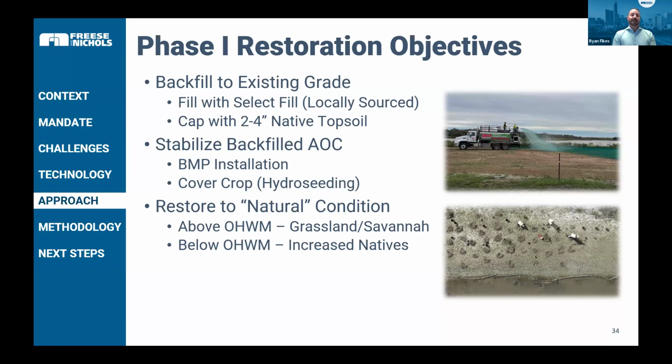And so if you had to collect data, wait to put it on a thumb drive, drive it back to an office multiple hours away, have it reevaluated, make tweaks, and couldn't do that in real time, it would slow the entire process. So this real-time coordination between field offices and our offices with our geospatial analysts has saved the client a lot of money and a lot of time on this project, and really kept from potential contamination, because you don't want to keep those cuts open after they've been made any longer than you have to, and run the risk of plastics falling into those and then reburying it and basically negating the entire issue that you were trying to fix there.